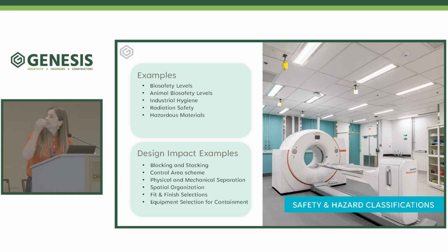The image here depicts a hot cell being installed in place, which is a heavily sealed containment chamber for the handling of radioactive materials. And as you can see, it's comprised of an immense amount of lead. So the shielding requirements here indicate very early structural impact and structural assessment that needs to be undertaken and understood. So this is an example, just one of many of these kinds of early impacts that get identified with the safety layer.